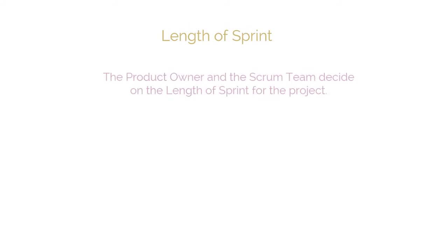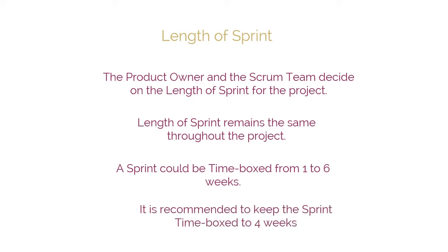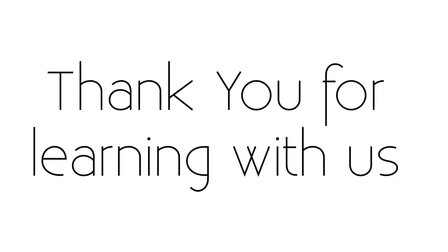Length of Sprint. Based on the various inputs including business requirements and release planning schedule, the product owner and the Scrum team decide on the length of sprint for the project. Once determined, the length of sprint often remains the same throughout the project. A sprint could be time-boxed from one to six weeks. However, to get maximum benefits from a Scrum project, it is always recommended to keep the sprint time-boxed to four weeks, unless there are projects with very stable requirements where sprints can extend up to six weeks.